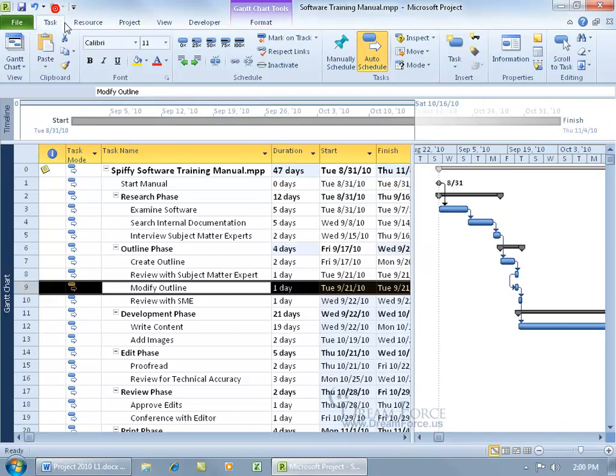And if I go redo, again, these 2 tasks are starting on the same day, which, by the way, if you look over in the Gantt chart, now look at the line. Instead of the default finish to start where the line comes out at the end, when it finishes that task and goes to the beginning of the next one, it now comes out at the beginning of the task and goes to the beginning of the next one, which means that they can both start at the same time. Well, it says that the predecessor must start before this task can start, so this one has to start even if it's just a minute.